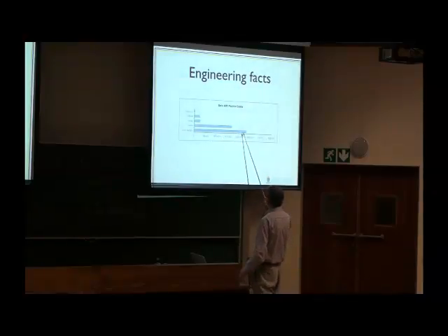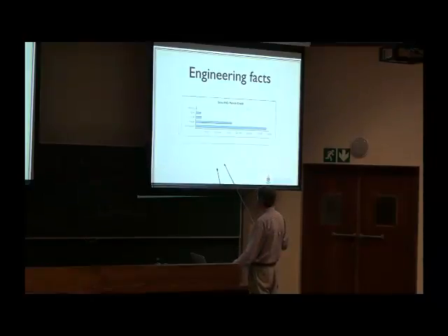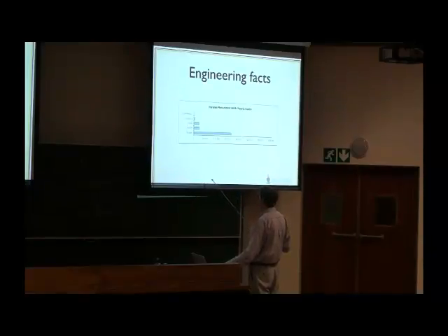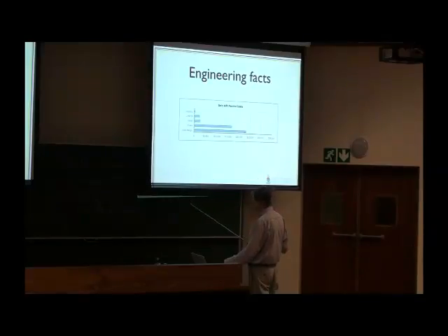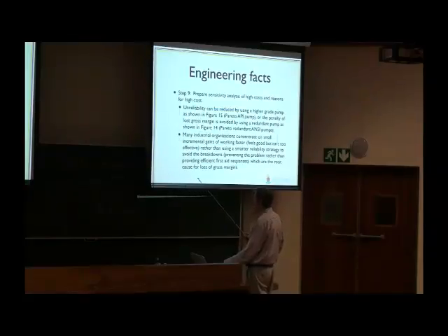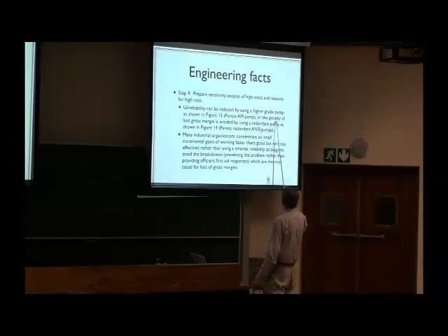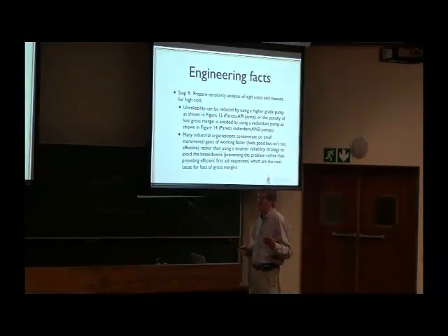In other words, we have a higher reliability, so we have a lower lost margin than in the first case. In this case, we had a nearly $35,000 lost margin. In this case, we only have $23,000 lost margin. So that's what we're saying. The other thing that we can do, or the penalty of the lost gross margin is avoided by using a redundant pump, because then you don't have that lost margin in any way. It's gone. So you lose that loss.